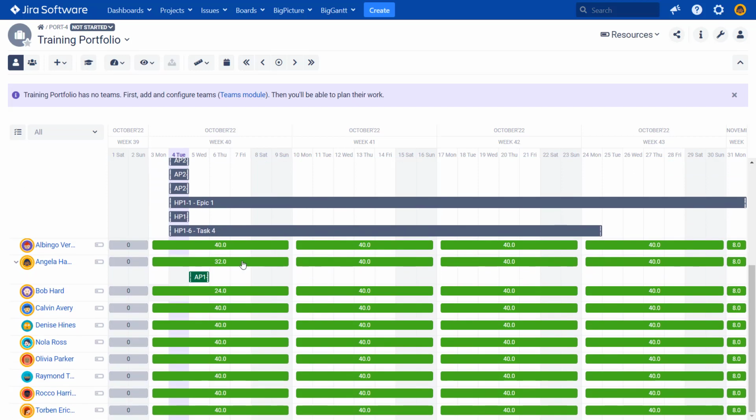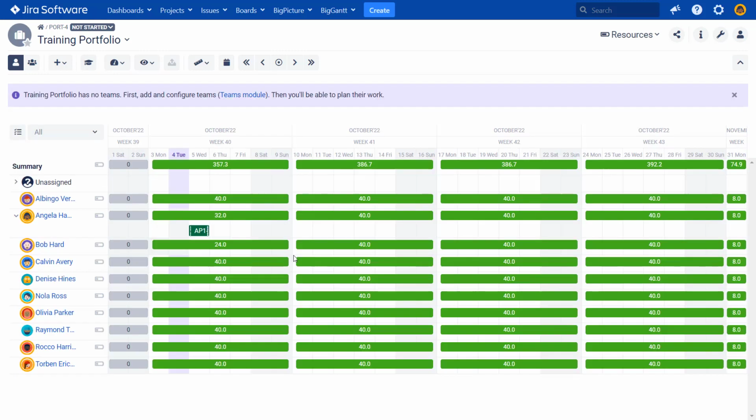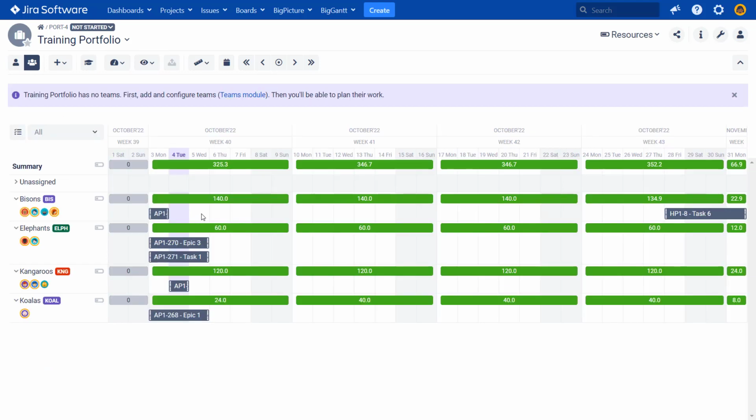And here, if there would be an estimate, I will actually put them in a moment, and after the cut show you how it looks with estimates. We will see what is the allocation for all the users, for all the teams from all projects. We will see a good overview of what is happening in the whole company. And if we over allocate a team, we will see it here. So basically it will be a scenario when probably two project managers will have to talk to each other to decide what is the priority, which task or task from which project should be done earlier or later.